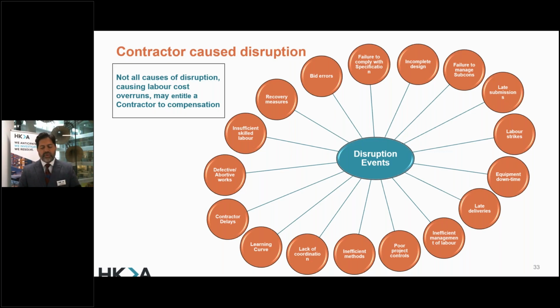We're looking at a significant amount of data at the moment on design delays, because nobody reasonably plans the time period for design reviews. You've thought about it, right? When the contractor submits their initial drawings, we will only take a week to review it, and then the construction drawings will be issued, and happy days, everything will be built on site. But we haven't thought about the comments exchange, red pens, draft 9, draft 11, draft 27 of the drawing before it goes into construction.